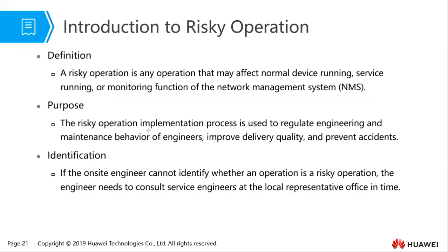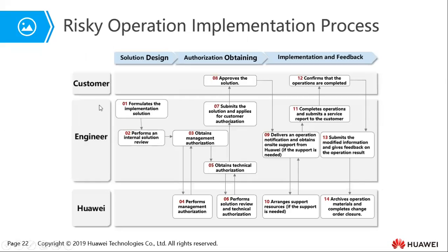Because any risky operation most of the time requires a team to be set up, a team that involves not just the internal team, but also external consultants. This is done so that we can ensure that we don't disrupt network services for a long time. And any risky operation, again, is normally performed during off-peak hours.